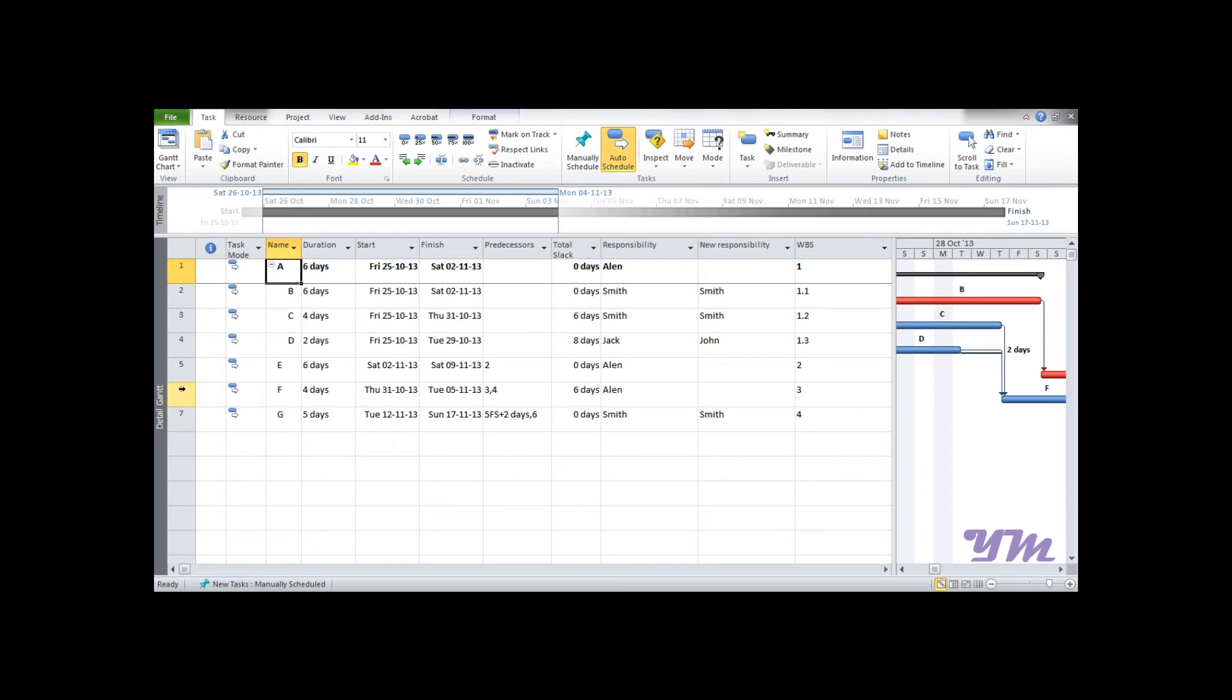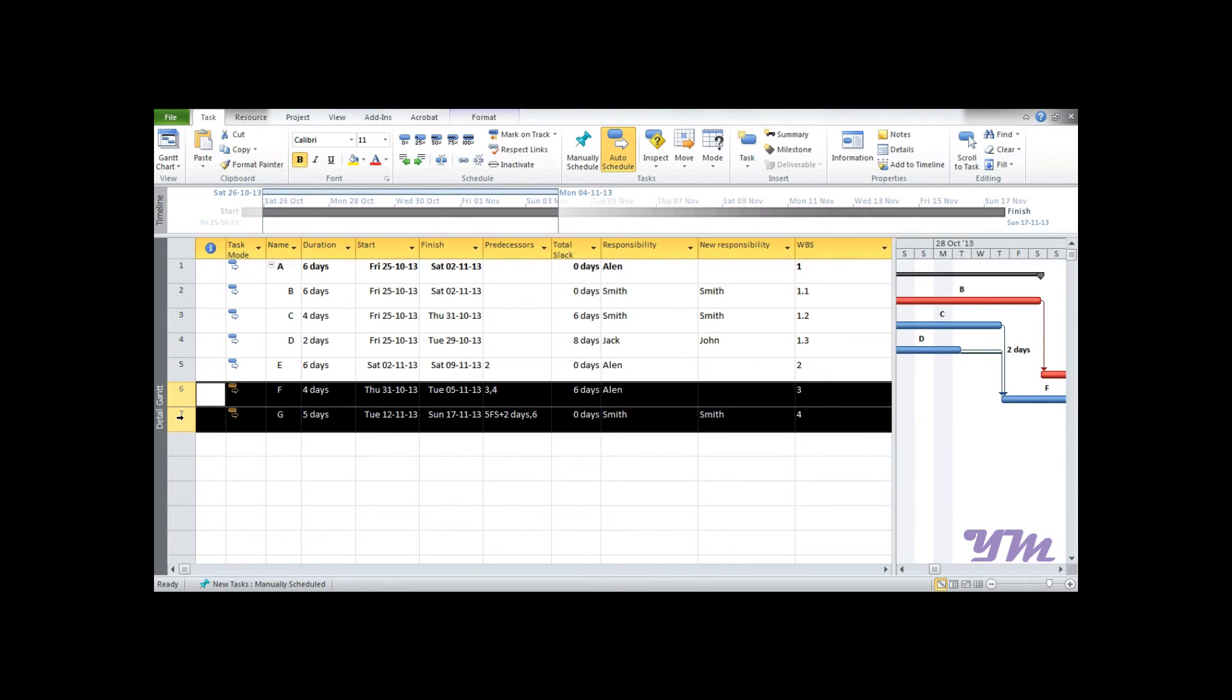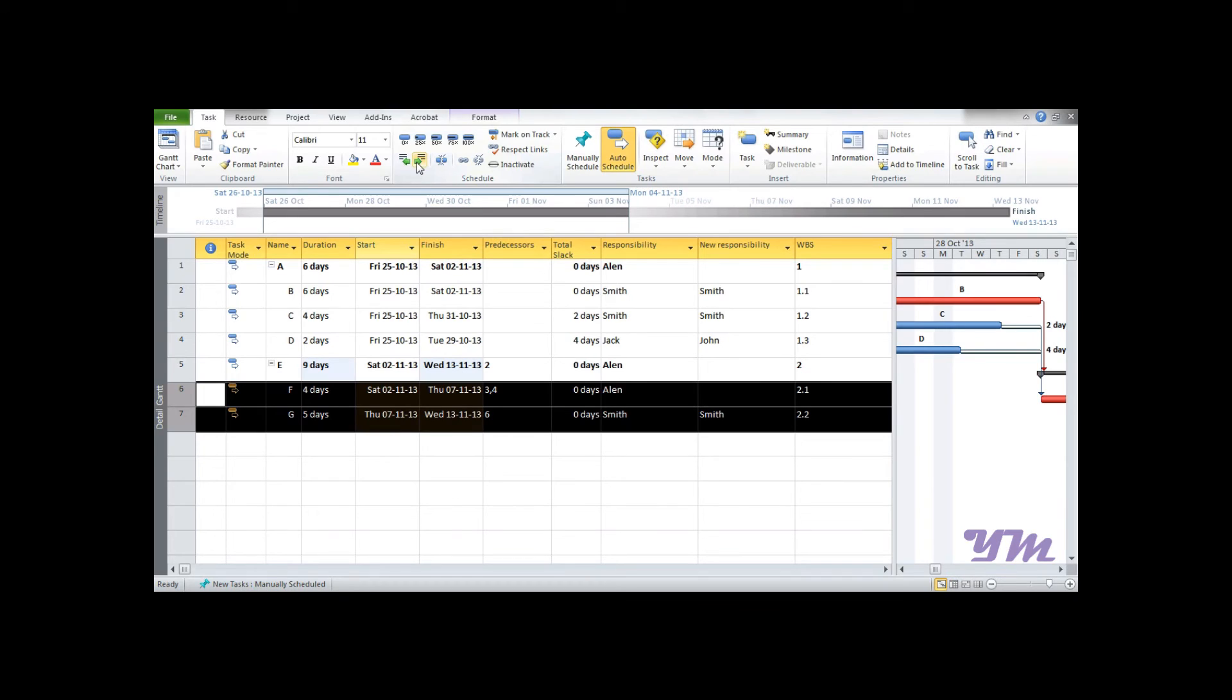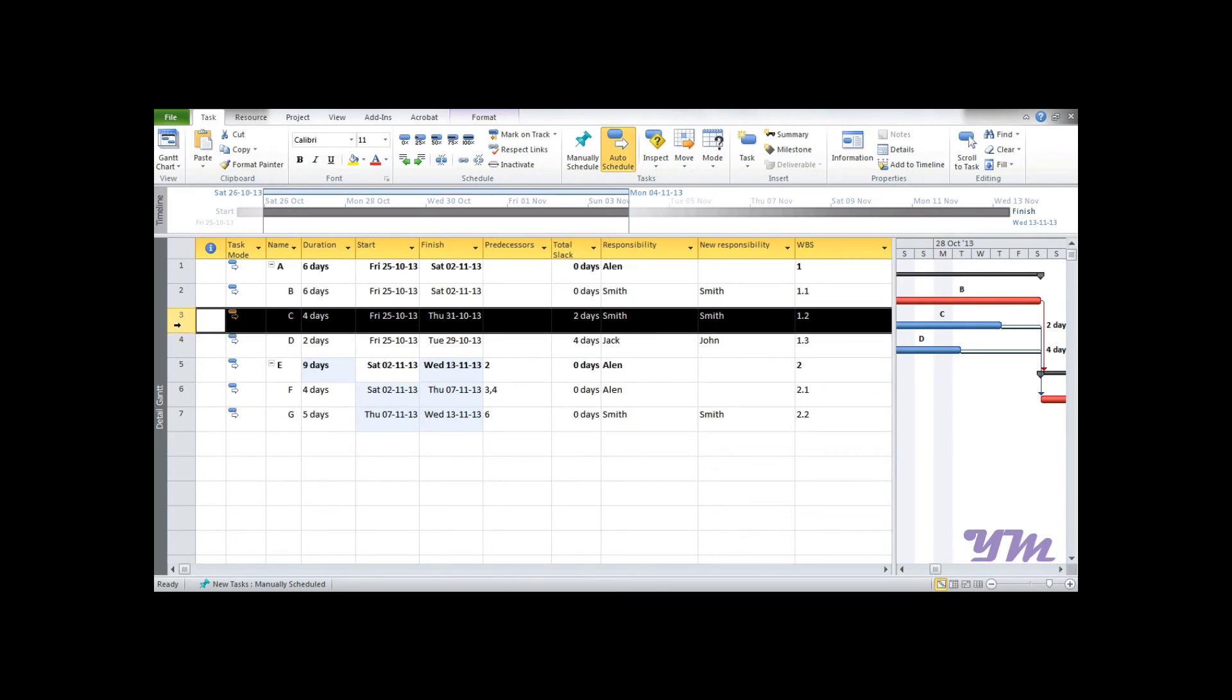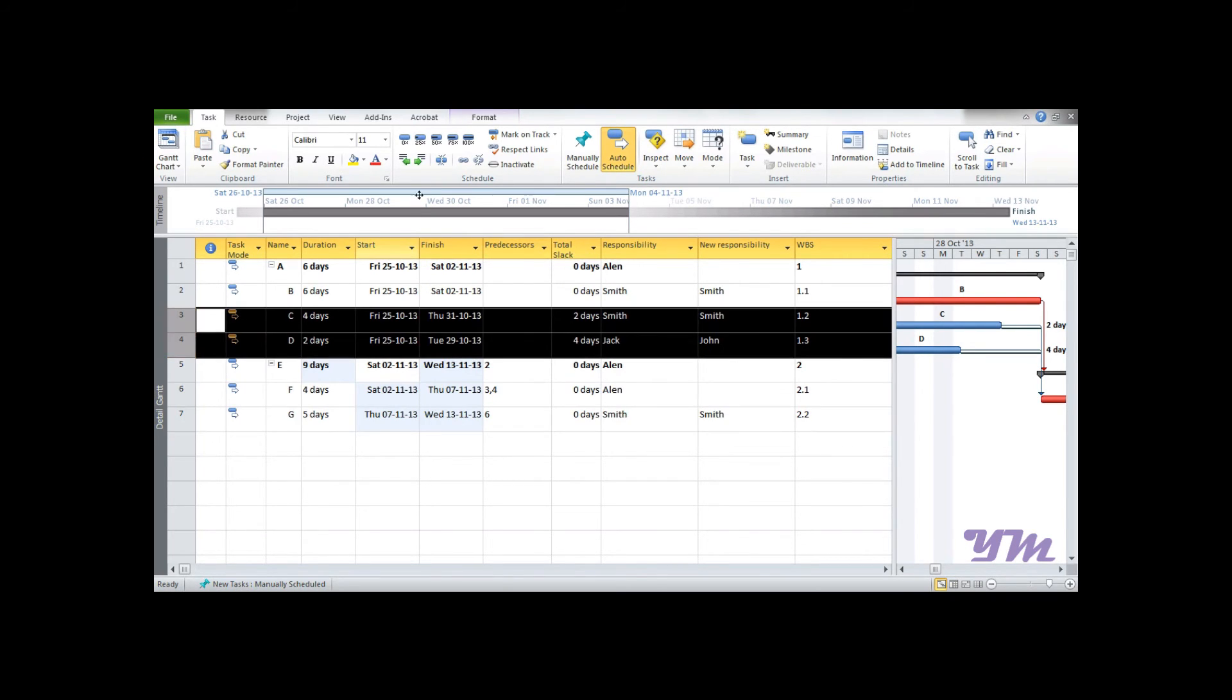Similarly, if you want to make F and G part of E, then select them, go over here and make them indent. So now F and G are part of E. Now suppose if I want to divide C and D and make them as a part of B, then again I select C and D and I indent it.